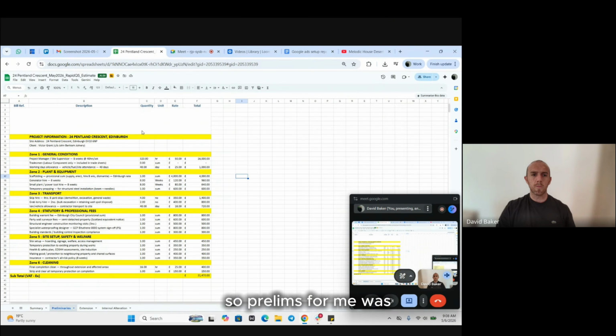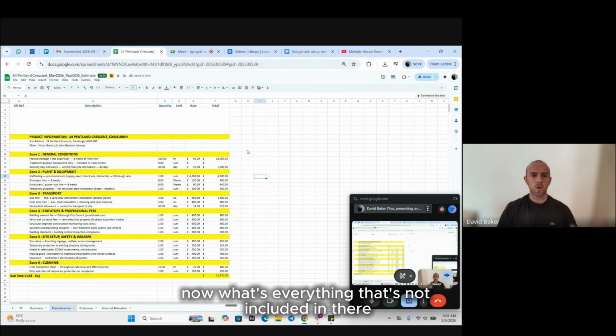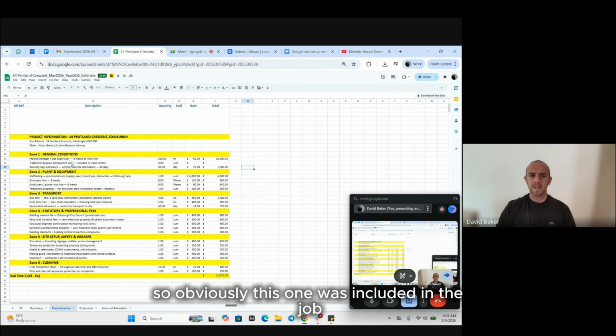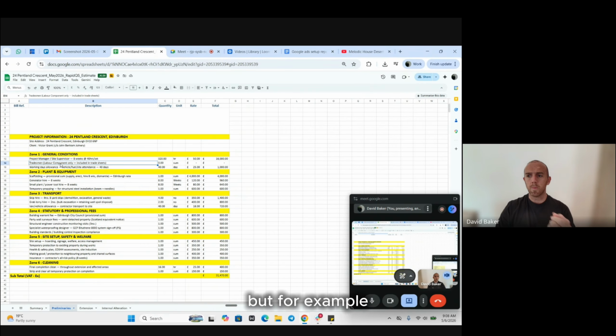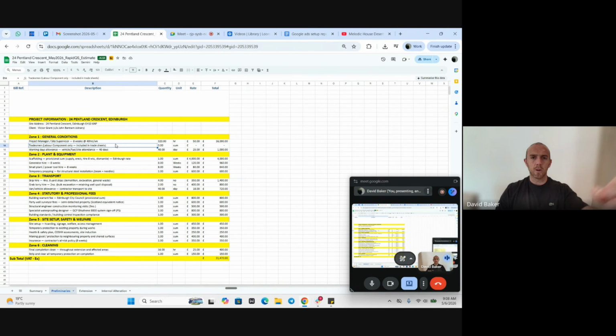So prelims for me was whenever you're pricing a project out and you're looking at, okay, cool, all the labor, all the materials. Now, what's everything that's not included in there? Project manager, tradesman labor, working days allowance, it's all those little things there. So obviously this one was included in the job. But for example, tradesman labor component would be lagging materials, taking window deliveries, cleaning up every single day, et cetera,